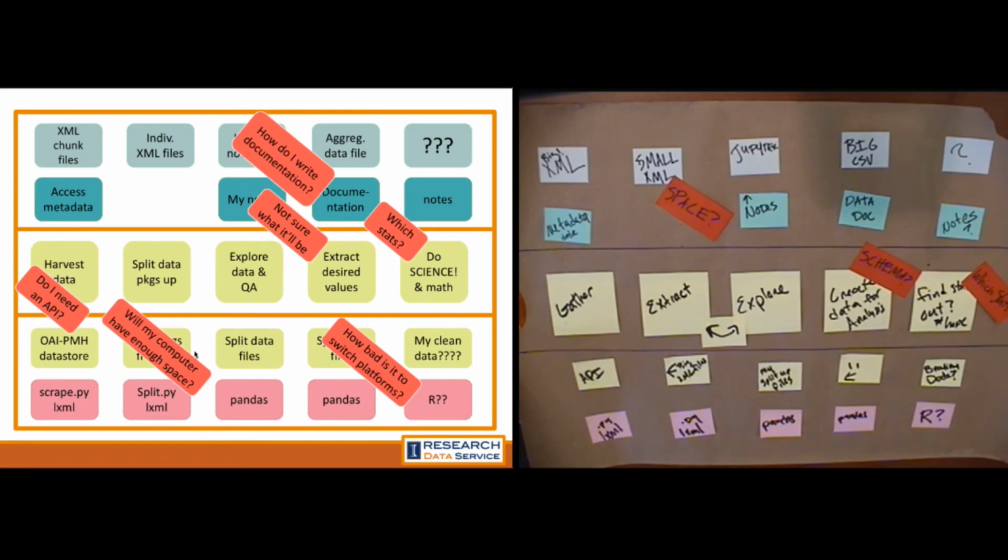And so if you're a team lead and you've got students, or particularly if you have a group that's all over the place and it's really hard to pin people down to have team meetings, have everyone do this independently, no talking to each other. At the very minimum, just lay out these center Post-it notes and have everyone describe the process of their data, and then have them email those pictures to you so you can understand people's conceptions of reality for that project.